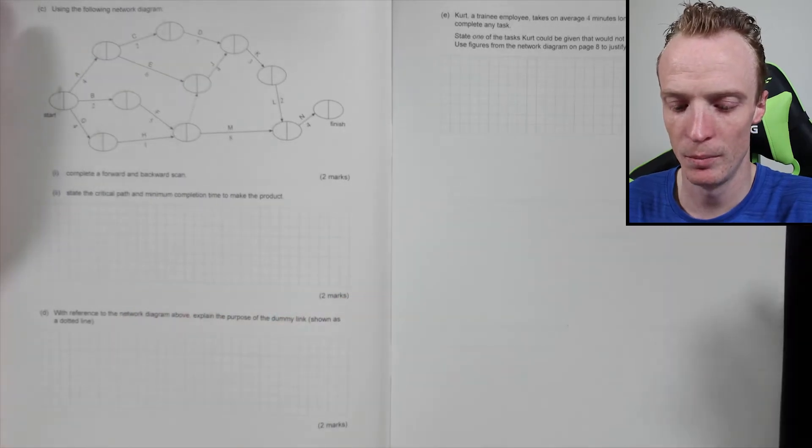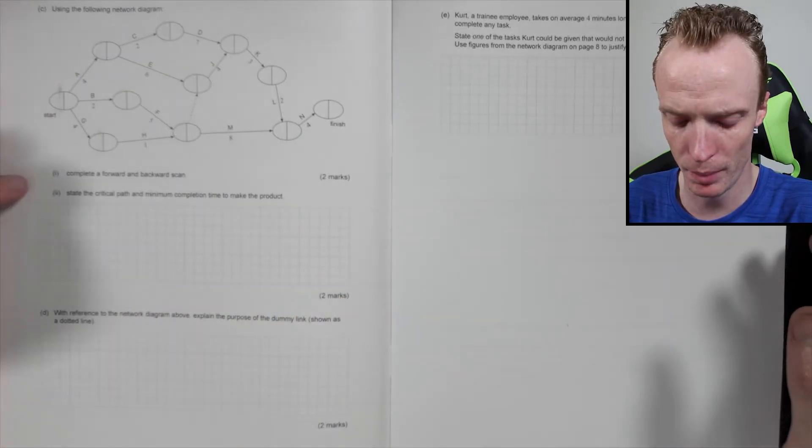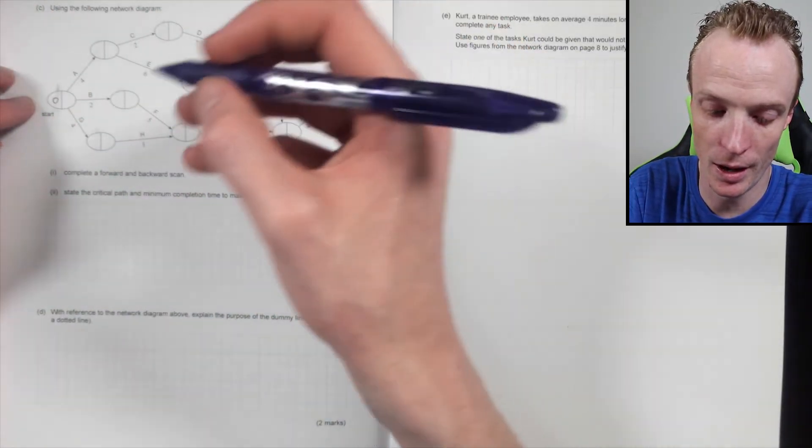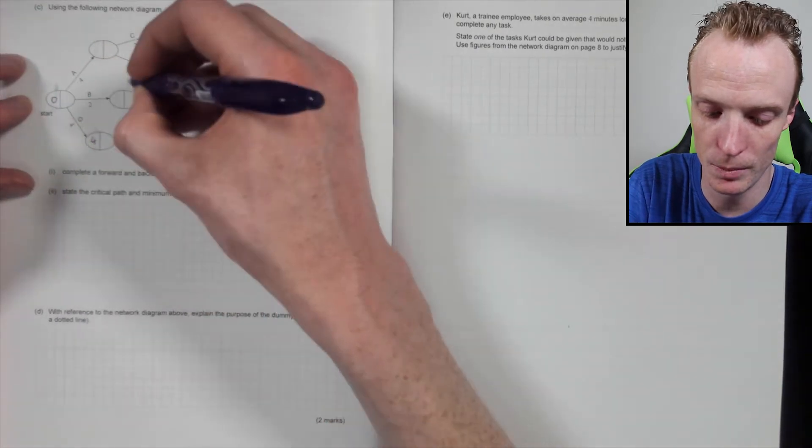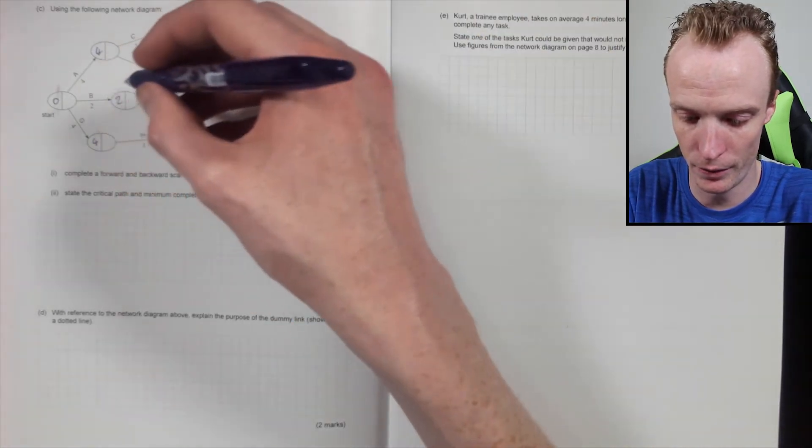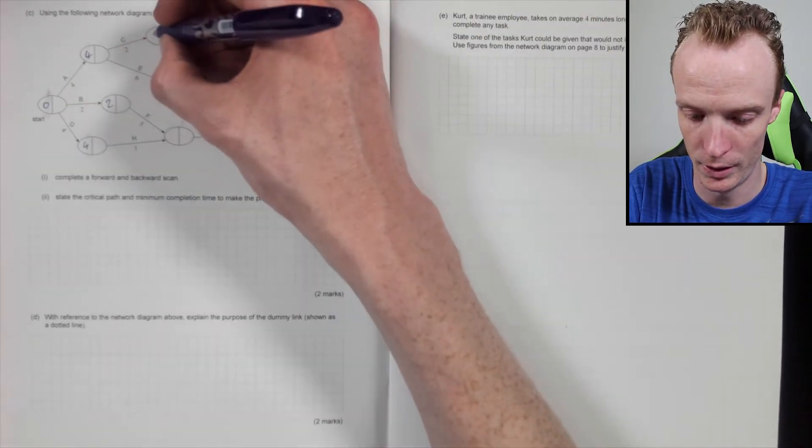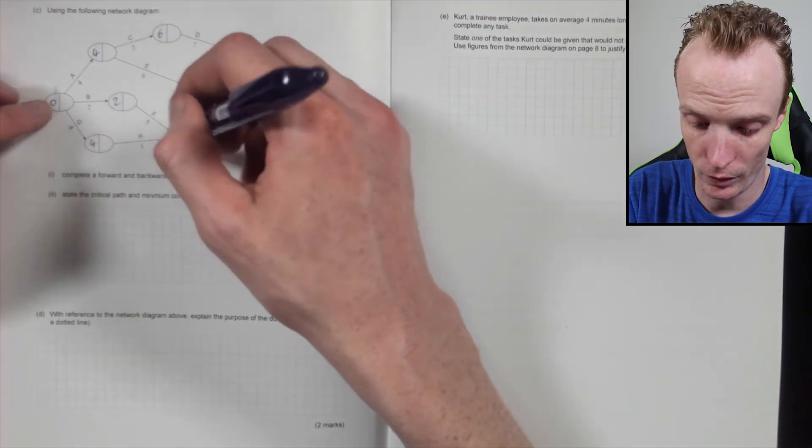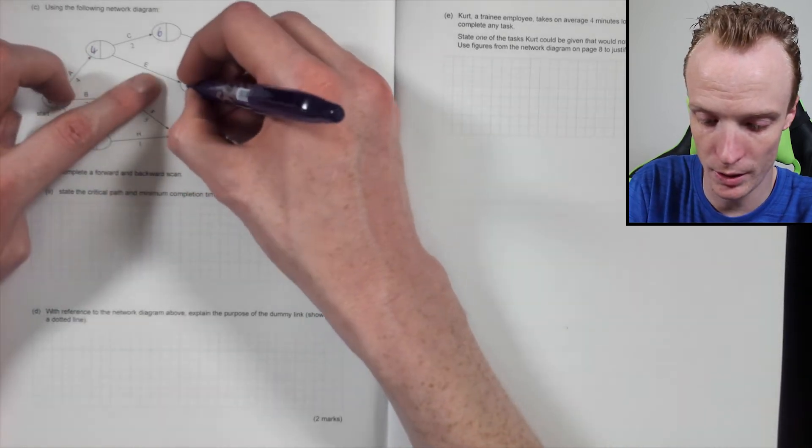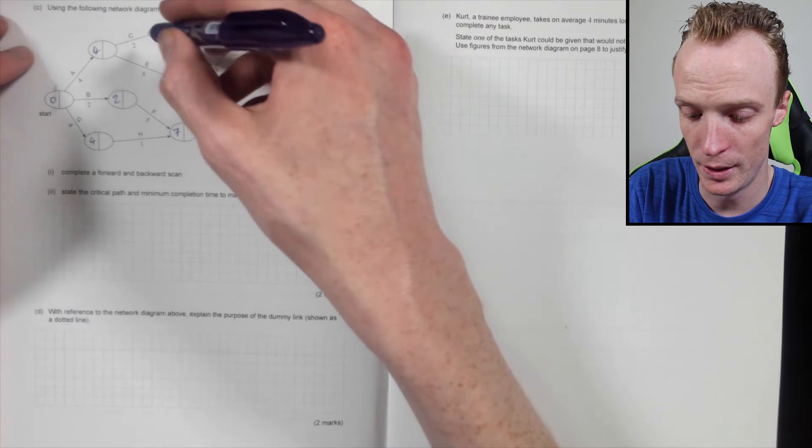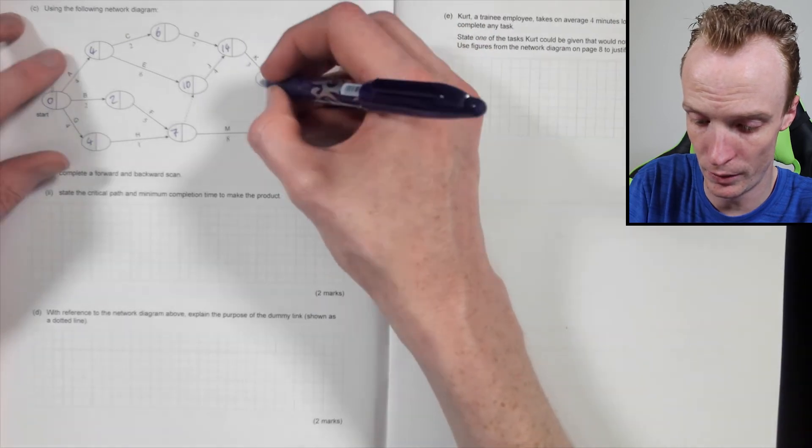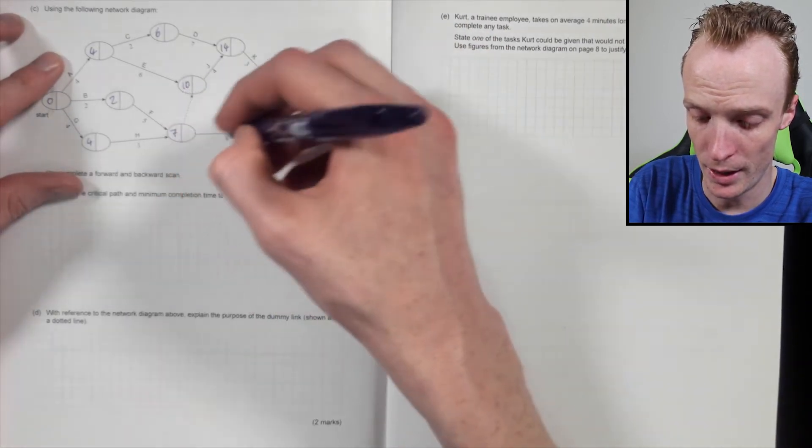Okay, so using the following diagram, complete the forward and back scan. Now during the forward scan you're basically just following these pathways and using the highest number each time. So that'll be 4, that'll be 2, that'll be 4. Then we will have 4 plus 2 is 6, that one's nice and easy. 2 + 5 is 7, so that'll be 7 there because that's 5. 7 or 10, so that'll have to be 10.